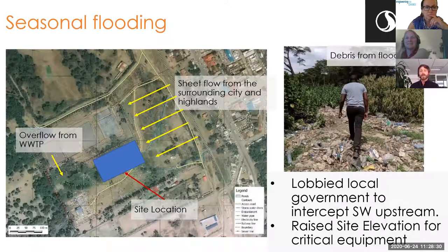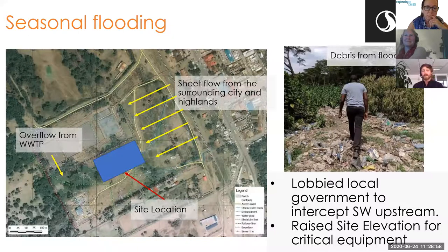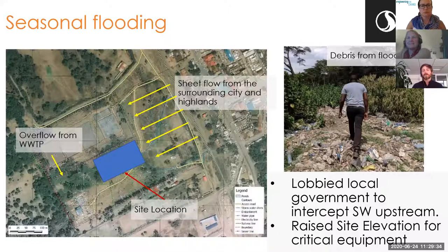Seasonal flooding was another major issue. Looking at the Naivasha town map, the hilly terrain creates sheet flow across the site during the rainy season. Worse, the wastewater treatment plant to the north actually overflows raw sludge onto the site location during parts of the year. Early in the project, we lobbied the government to intercept that flow along a main road and funnel it into an existing ditch. They agreed to take on that task, but knowing the risk is large, we still raised our site to protect critical equipment during the rainy season and added ditches and canals — while still relying on the government for that primary diversion.